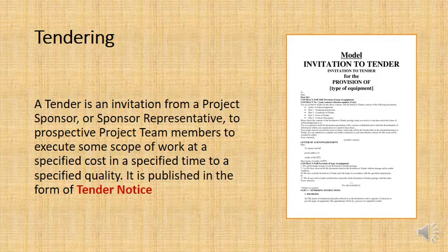But yeah, it's basically a way for the work to be auctioned off to prospective project team members, to prospective contractors, and then later, when they've made their bids, you would assess their bids not only for the cost that they are willing to do the project for, but you also assess their CVs, their experience, because you want the work done to a certain level of quality, and also if they have a reputation for finishing work on time or not. Those are part of the tender evaluation process.